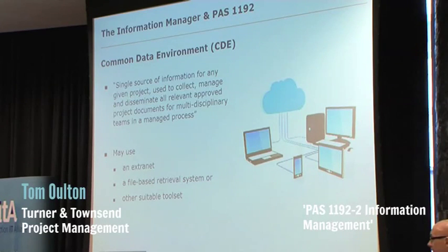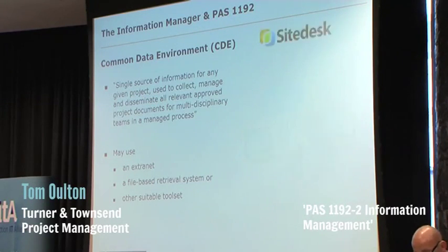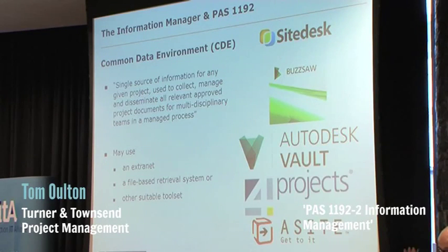It could be a cloud-based thing, could be server-based. There are lots of common data environment providers out there. These are some, there are others. Inclusion is not an endorsement, it's just these are some. It allows the information to be shared efficiently, accurately and securely between all members of a project team. The aim of the CDE is primarily to overcome issues regarding accuracy and ambiguity and completeness of construction design information. And what's important as well is it's auditable. So you can see what decision was made when and when people are using the right information.